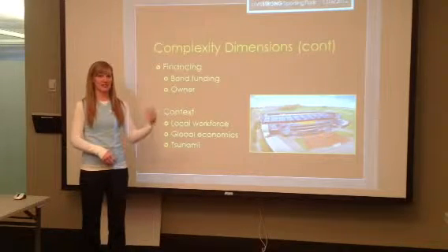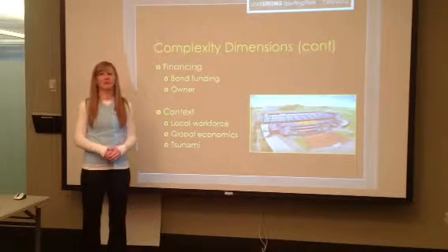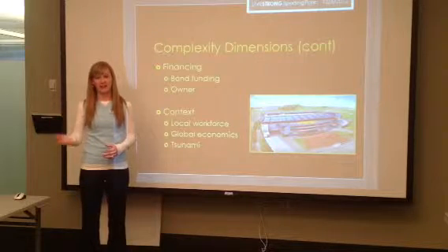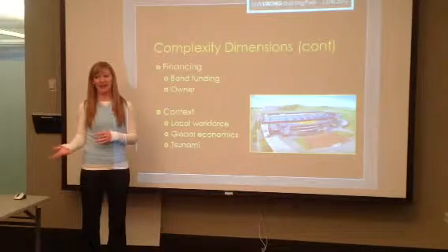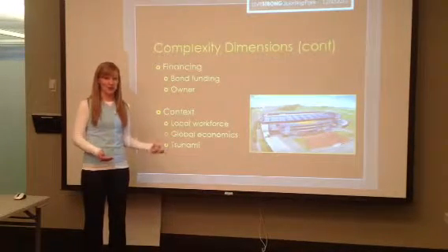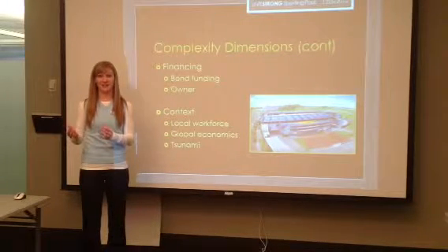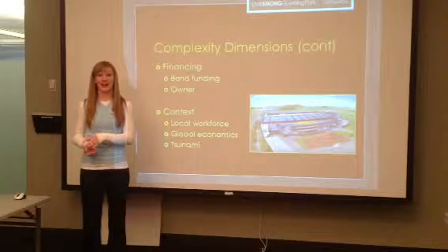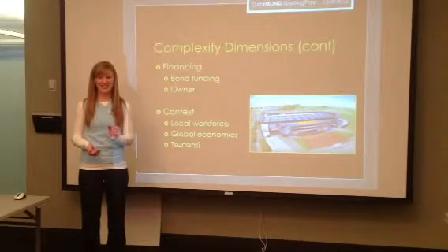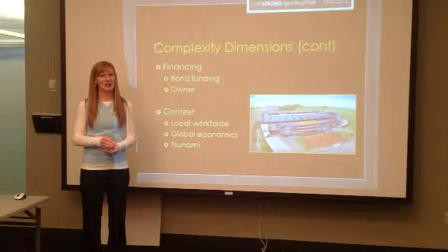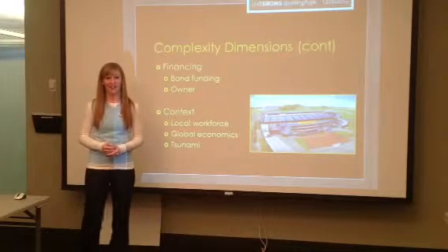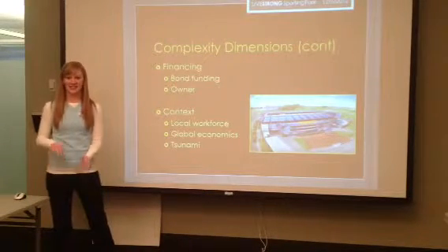We also encountered some global economics. As I mentioned, some of the seats were made in Spain. We also had portions of the stadium seats fabricated in Japan, and as you all know, there was a tsunami there in 2011. Fortunately, the boat with our stadium seat components got out just in time before the tsunami hit, because if it hadn't, we would have been in a bind trying to find our seat armrests.